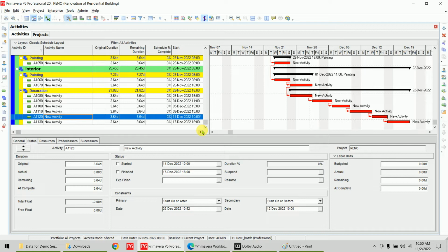But once we have applied them in several areas, while adding the field, we can come to know which activities have constraints given. With the help of this star icon, you will understand whether any constraint is applied or not. Star is one of the checkpoints. Other than that, in the field, right click, add constraints, so it will show what constraints are added against each activity. So by that we can recheck at a later stage.